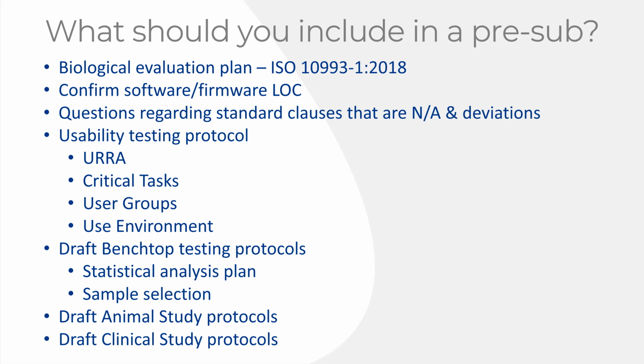Well, they balk at the label because they haven't created one yet. I'm like, technically, the label isn't required. Technically, the instructions for use aren't required. But I know that if you don't already have one, and we're doing a pre-sub now, we're going to have problems later with you still not having it ready. So I'm asking for it now, even though it's not required. Start working on it now.